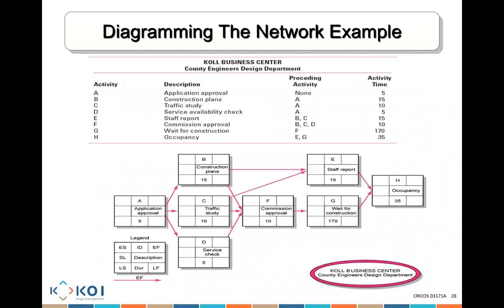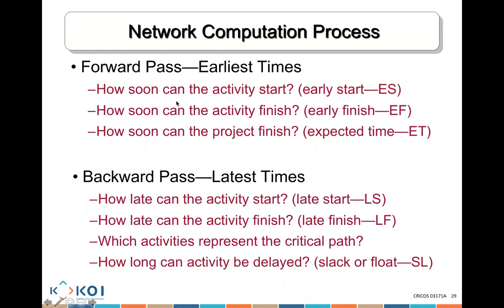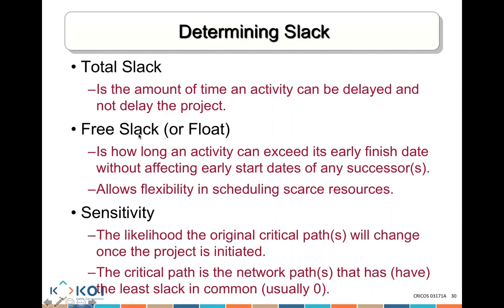So if I look here, if the slack here is 1 day, and that one day won't affect the duration of the next activity, this is what we call free slack. There are activities that have a slack which would impact the overall project. If I have that slack, how long is the amount without delaying my project?